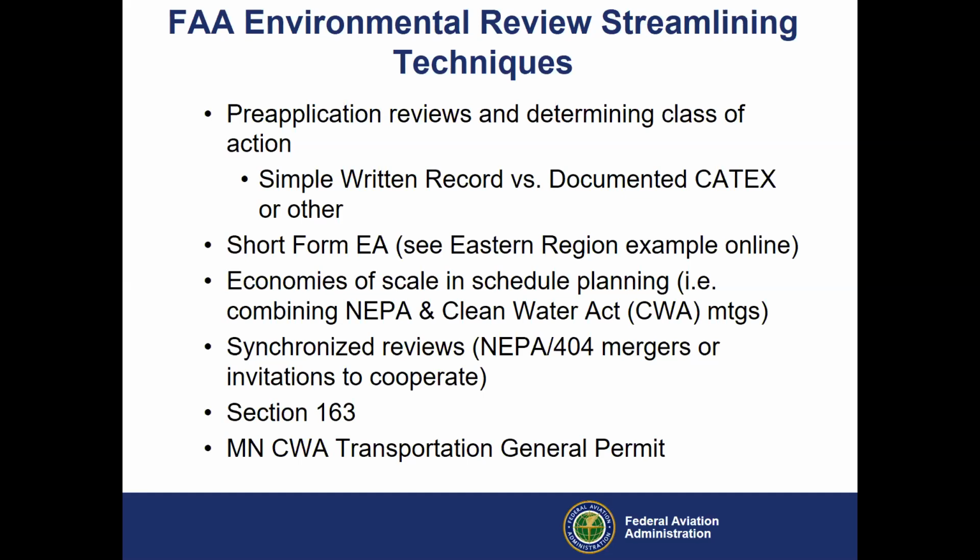Basically that, assume you go through the 163 exemption process here, which we are doing now internally as a district office. If that's shown to be exempt, then you would be exempt from NEPA review for that project as well. Again, this is all a little bit new. There's some growing pains with it as well, but we're learning and getting more refined in our reviews of those. So again, an opportunity for NEPA exemptions at times.